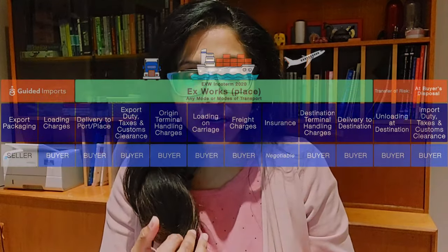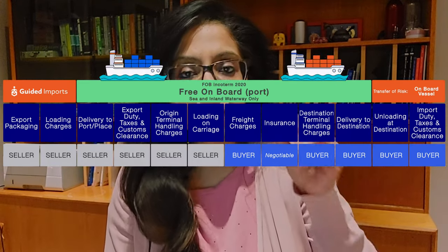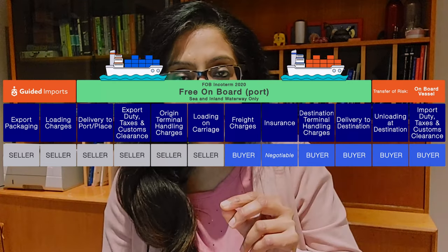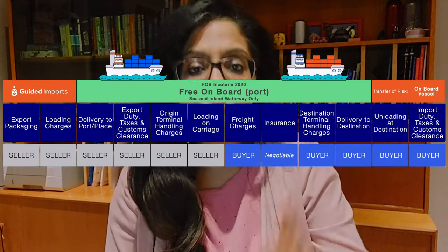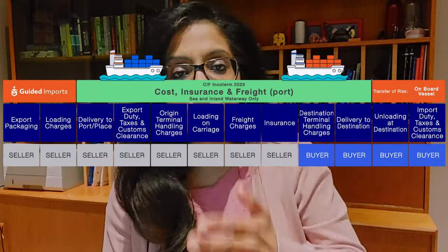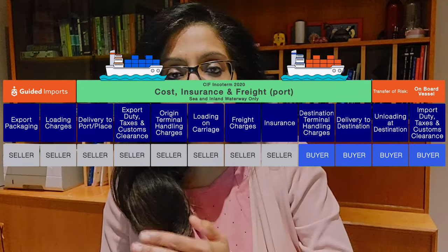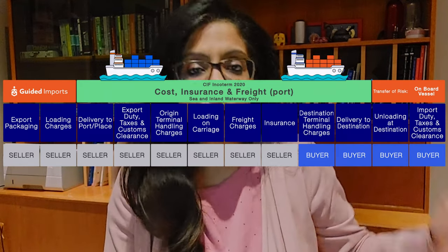So when they say the delivery terms, you'll come across a few terminologies which I have covered in the previous videos, but a quick recap: you will come across something called Ex Works, you will come across something called FOB and CNF. So Ex Works means that the price they are quoting you is for picking up from their factory. And if it's FOB, or free on board, it means that it's a price up to the supplier's port. So if it's an Indian port, Mumbai port, it will be up to the Mumbai port. And if it's CNF or CIF, it will be cost and freight, or cost, insurance and freight, which means they cover all the cost, including the shipping, up to the destination port, which is in the UK or the country wherever you are based.